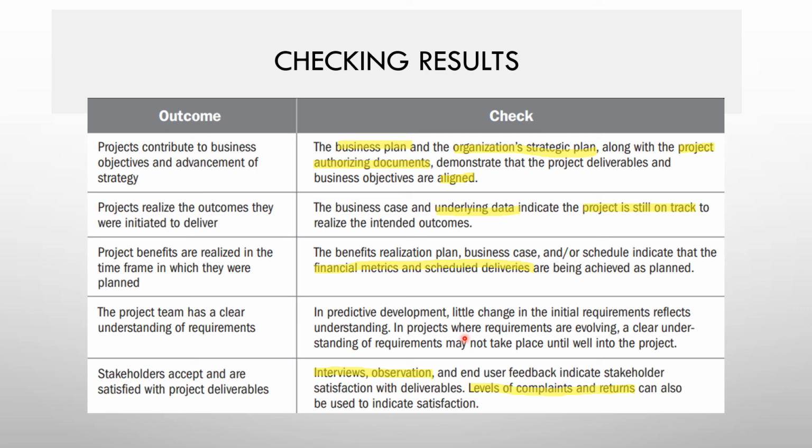At the same time, it is signed off and agreed upon with existing project team members. In an adaptive method, in a sprint planning meeting, it is ensured that the product backlog is getting groomed. In the grooming sessions and sprint planning sessions, the team will agree, this is my sprint goal, I understood, right? The definition of ready is given, and the stories that meet the definition of ready are taken into the sprint and completed according to the definition of done. So that's how the understanding of the requirements is managed in both predictive and adaptive methods, right?